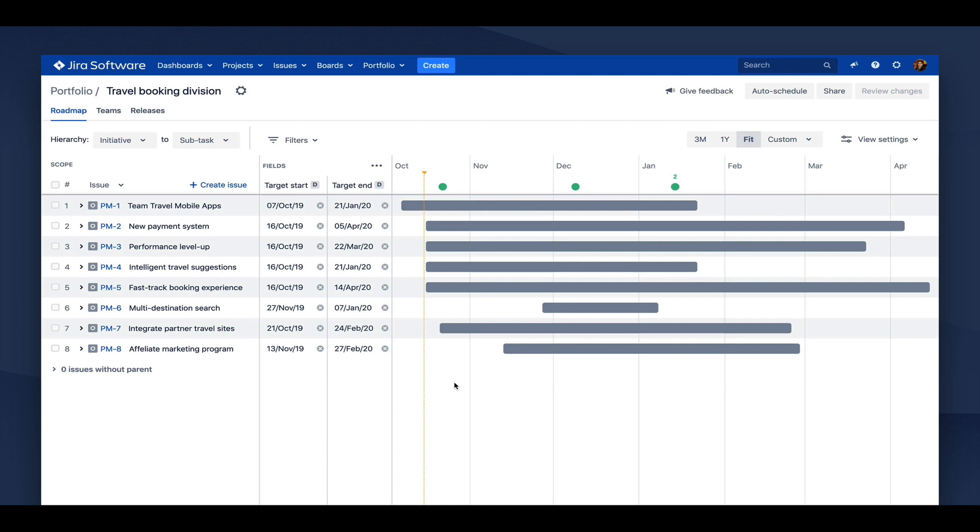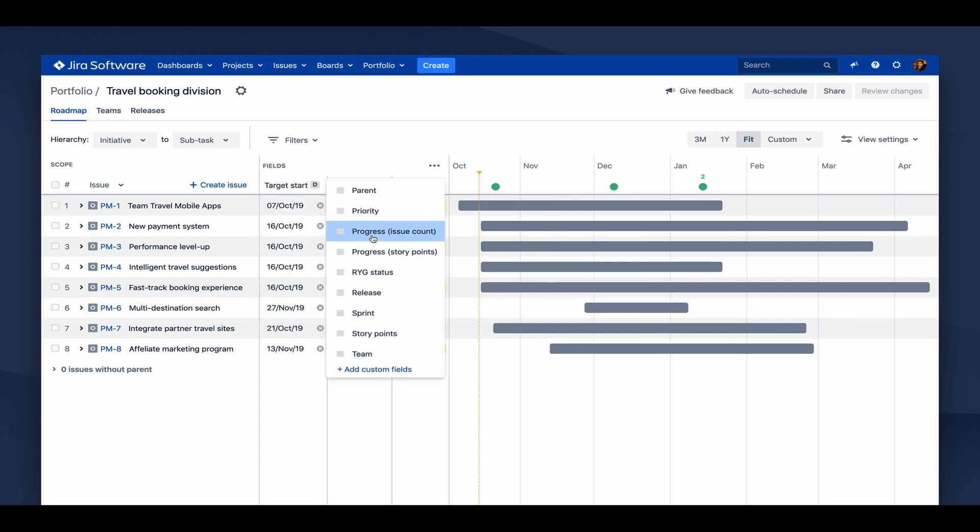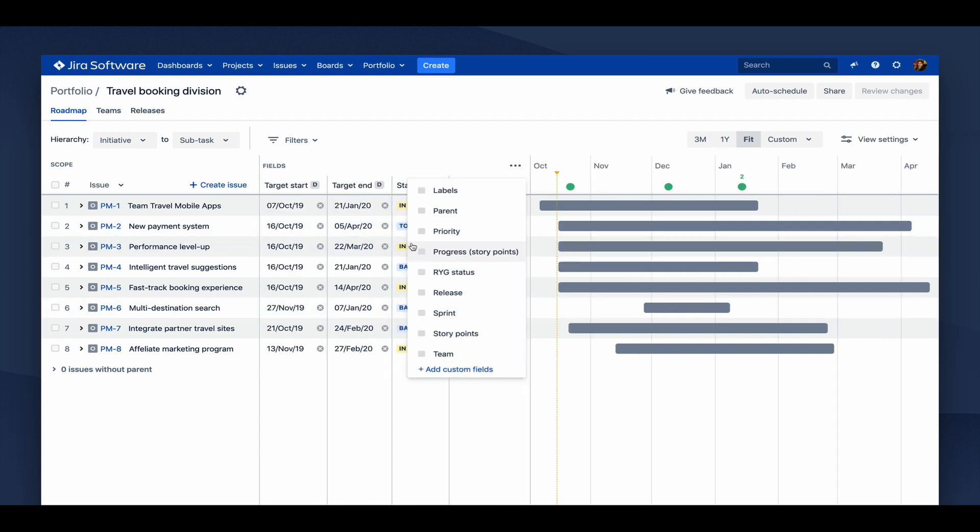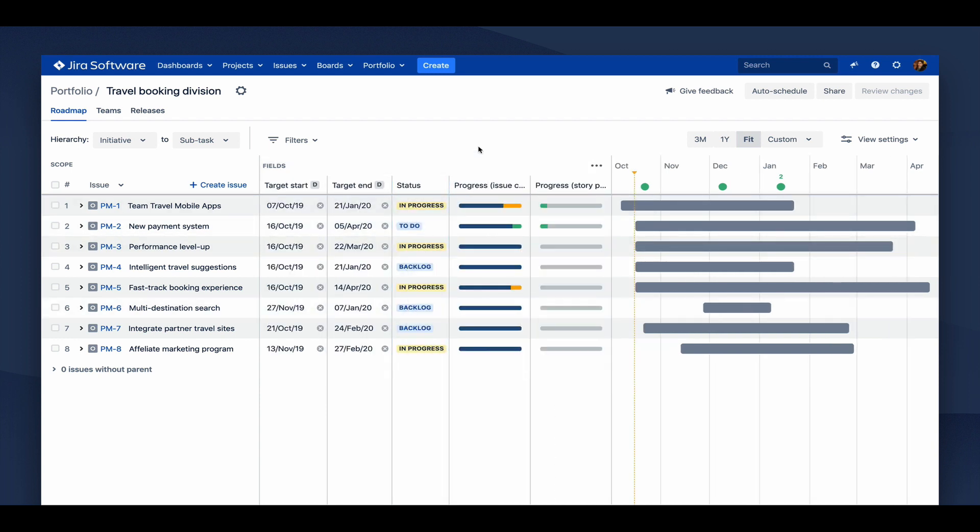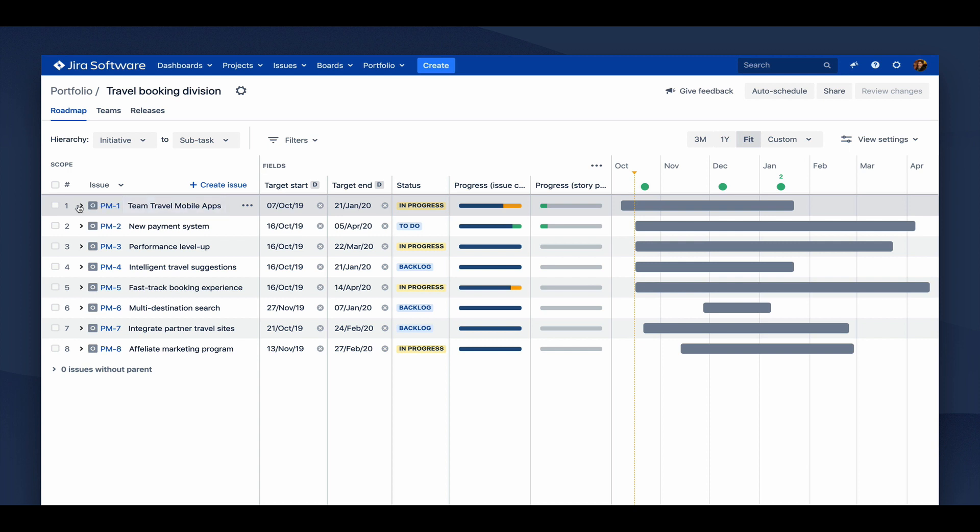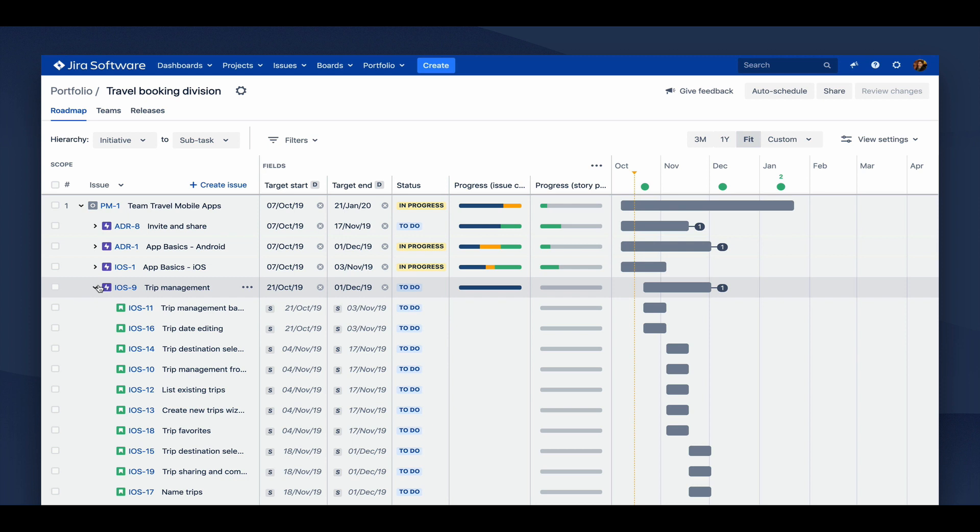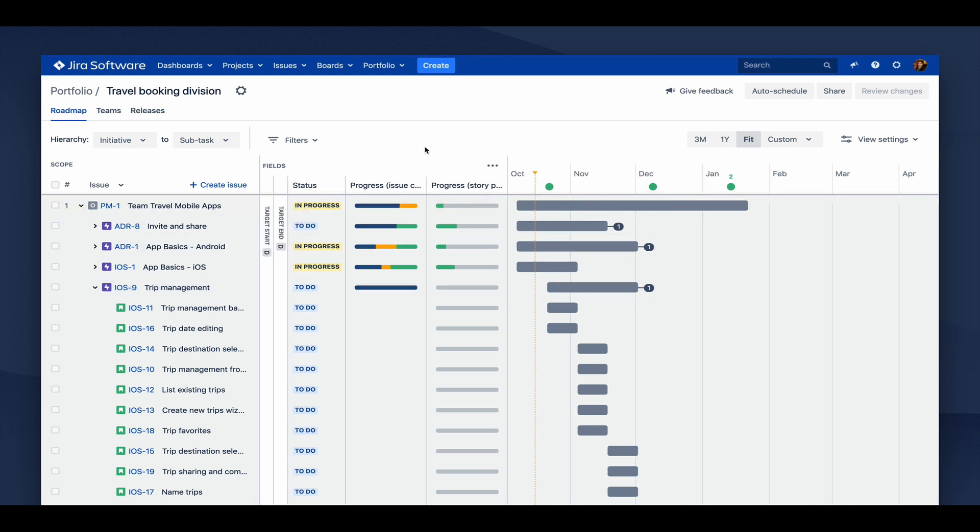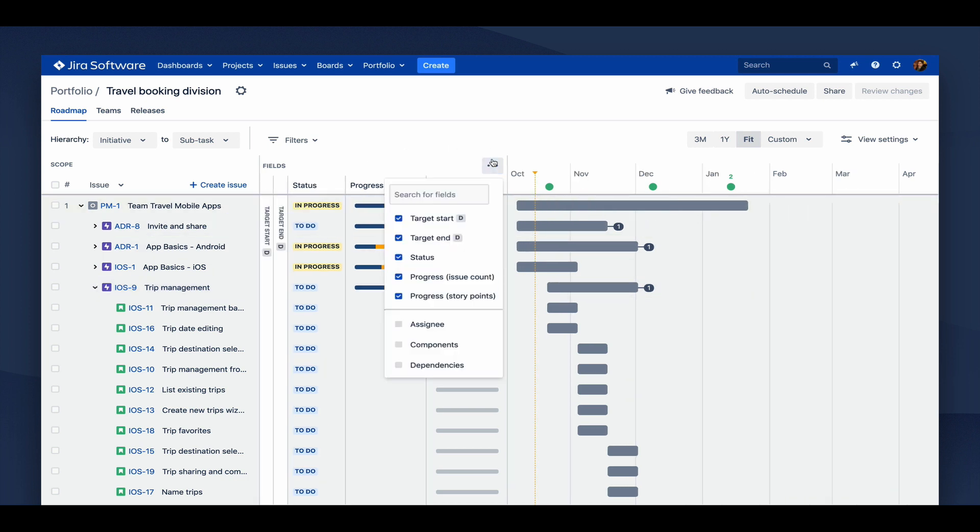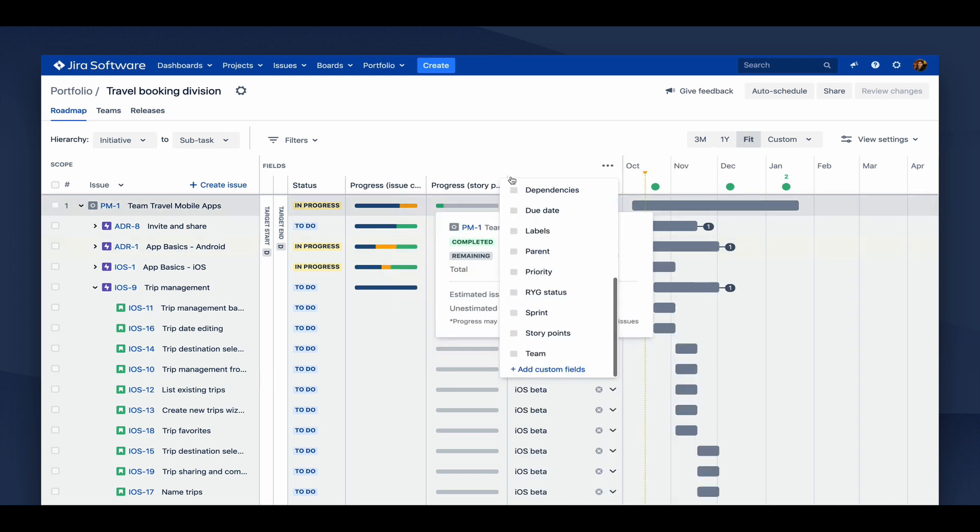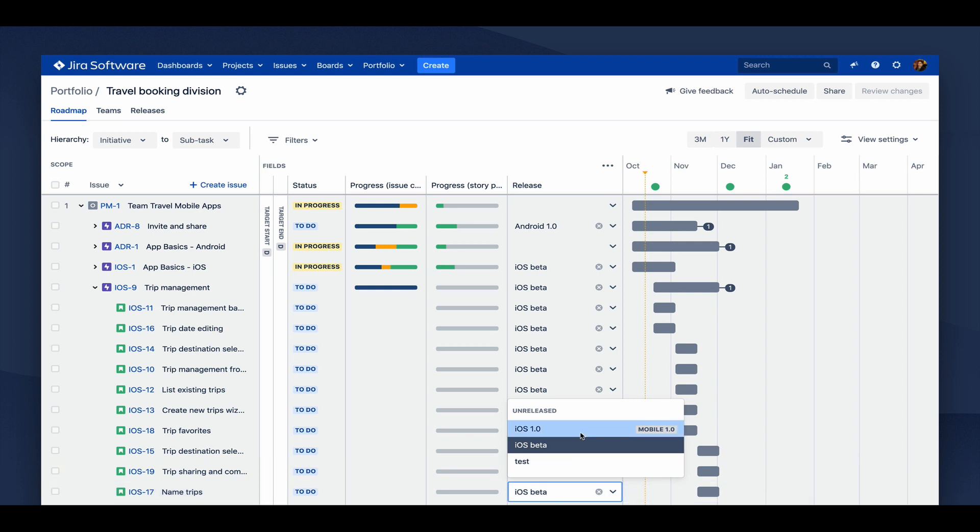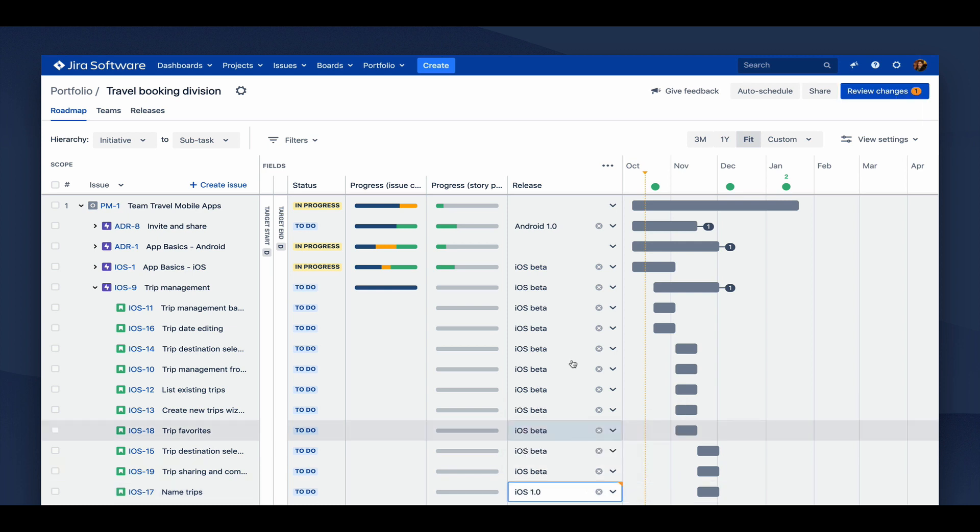First, we'll show how this interface is great for surfacing information from issues as well as managing changes on issues. Starting with an existing plan, we'll add some more fields to see what's going on. The status and progress fields give us an indication of what's happening with an issue and its children. We can drill down into the descendants of an issue, see the epics in the initiative, and even drill down into the stories. So we'll make some changes here. We'll quickly give ourselves a bit more space to work with and show targeted releases. From here, we can directly update the targeted release for an issue. That's just some of the basic controls for managing issues.